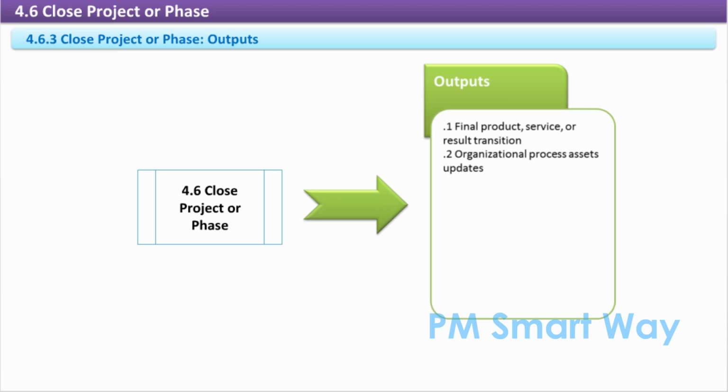Project or phase closure documents consist of formal documentation that indicates completion of the project or phase and the transfer of the completed project or phase deliverables to others, such as an operations group or to the next phase. During project closure, the project manager reviews prior phase documentation, customer acceptance documentation from the verify scope process and the contract if applicable, to ensure that all project requirements are complete prior to finalizing the closure of the project.